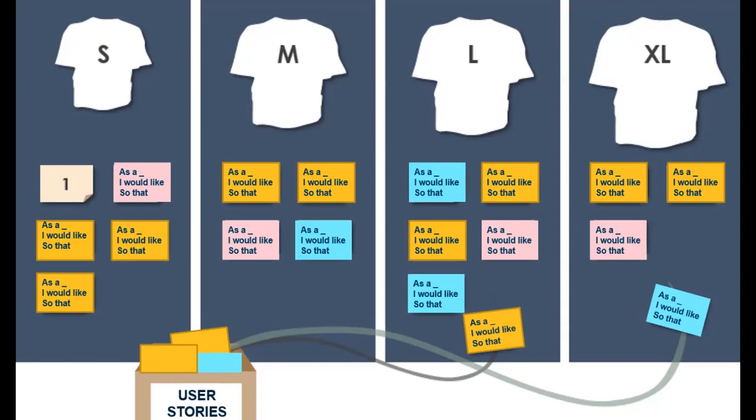Now, on the back end, you've got to remember that these S, M, L, and XL have points behind them. So when all is said and done, the Scrum Master, for example, could go back in and calculate the actual story points, but we take them away from view.